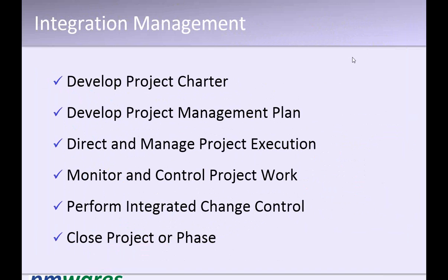Just want to reconfirm my understanding. You said that as a part of the project closure, we can have either phase closure or a total project closure. Now, three things. The first thing is the transition, which is either to a next phase or to the operation team. Correct. In case of final project, correct? Correct. The second thing is the lessons learned. Yes. And the third thing is the project archives. Yes. All the documents of the project are archived.